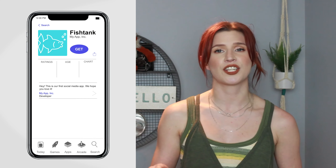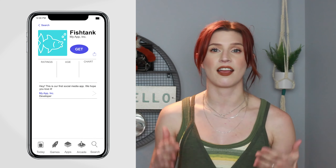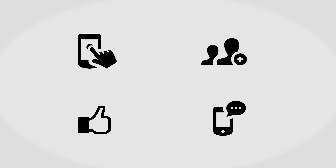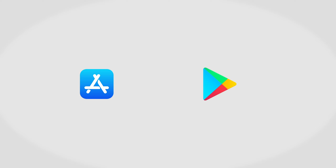Let's say that you're making a social media app. If you're using an agile method, you won't start out by thinking of every single possible feature you can squeeze into your app. Instead, you'll start with the basics — giving users the ability to make posts, follow other users, engage with other users' posts, and get notified when somebody engages with your post. You call this software version 1.0 and publish it to the App Store and Google Play Store.